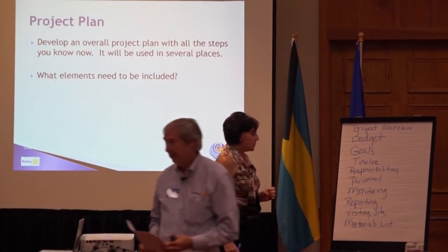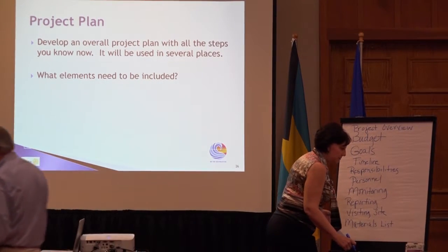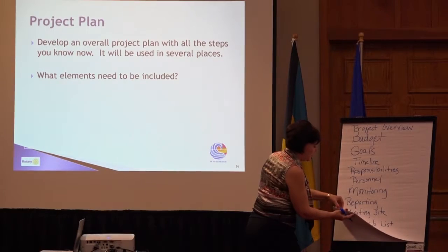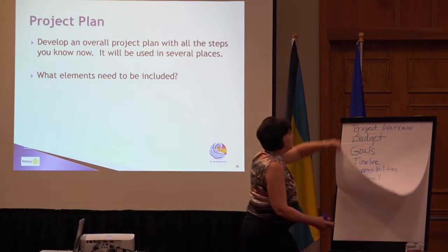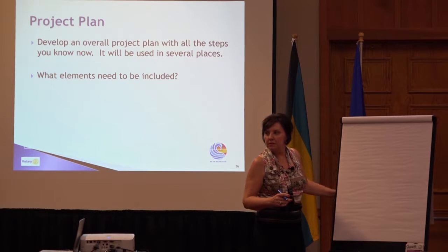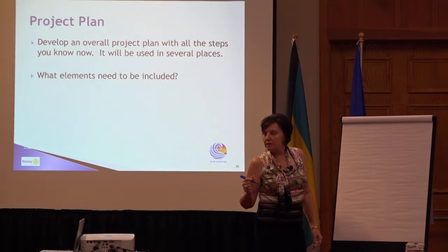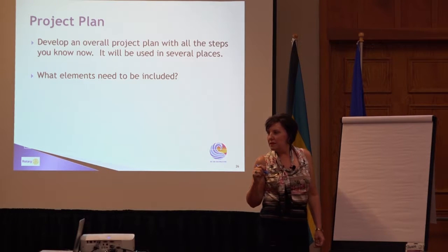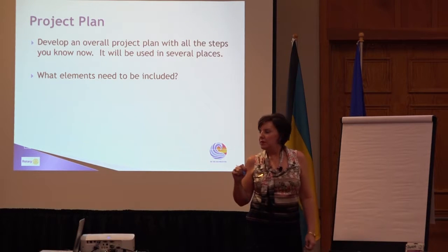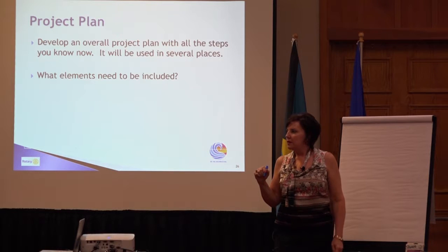Yep, bidding. In some projects, you need an NGO, a non-government organization. Why would you need an NGO? Well, some countries require that. We did a project in the Dominican Republic, and we're doing a project now in Nicaragua, and the country requires that if you bring money into the country, it's got to be overseen by a non-government organization.